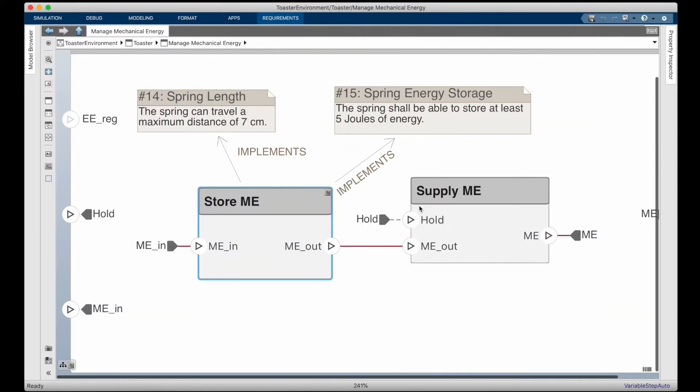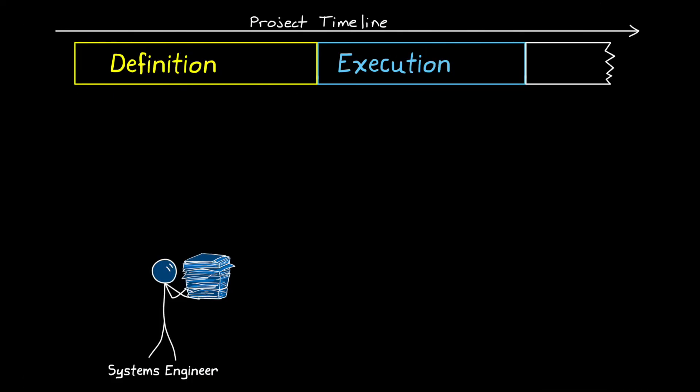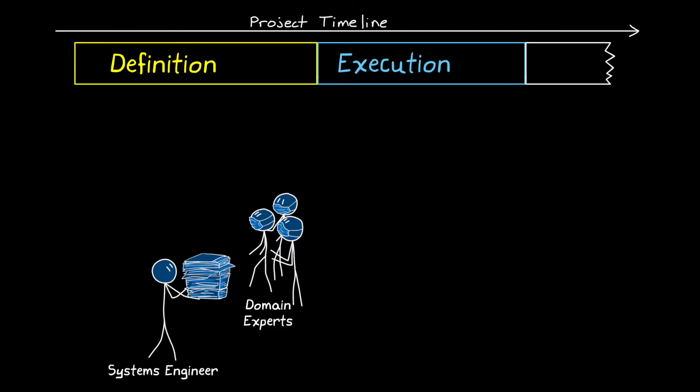Remember, with the toaster example from the last video, requirements decomposition, which is part of definition, required an assumption about an implementation. And this level of specificity can't be done without the domain expert performing trade studies and determining what's feasible and ultimately helping to choose the best implementation to go forward with.